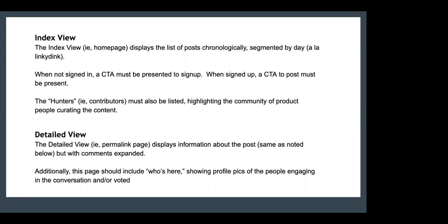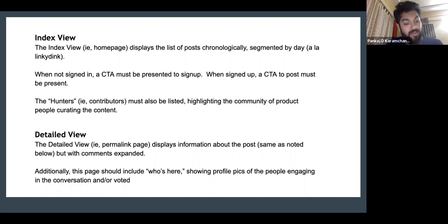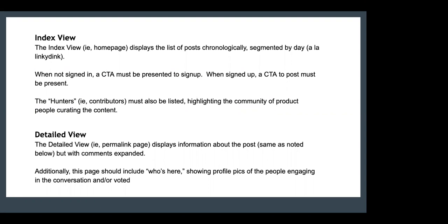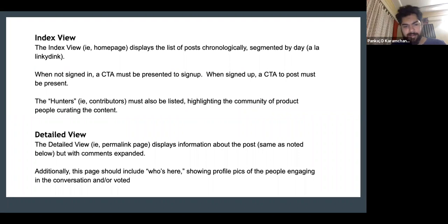So instead of making the final designs on the mockups with the designer for the entire application first, you don't need to do the entire application. Just do it for the features which will be picked up in your immediate sprint. Right. But before that, if you can just have the flow or the normal wireframes for the entire flow of the application, so you know that after the entire design and development, you're going to get something which has all these features. That can be done. Yeah, that's okay.